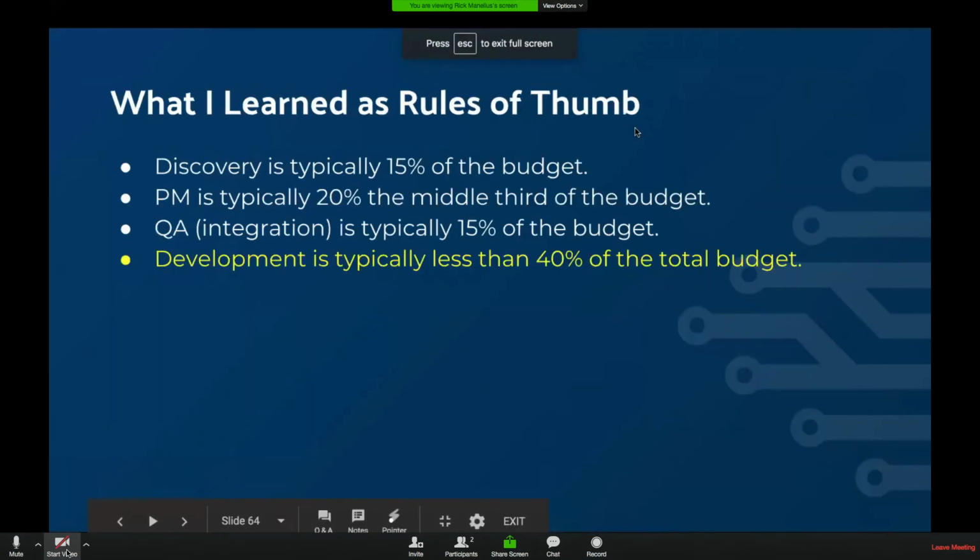So that's basically it, but there are some really cool things that you learn about your organization as you do this, which is, I don't know why this is like a magic number for me, but I found that if I target the discovery process to be about 50% of the budget, that was the sweet spot. If we spent too much of the budget, like 30% talking and planning, we overplanned. And you're still not going to avoid certain things that come up, and you write out a development budget because you spent too much time planning. But if my discovery meetings and those interviews with the client were less than that, that's where we got in trouble.